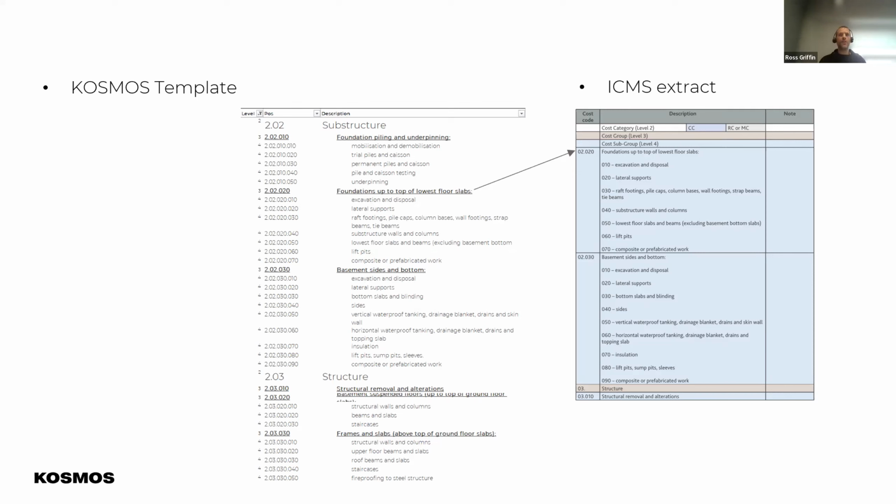We need that initial numbering system here to carry it for us under construction costs, because ICMS is not just construction costs, it's acquisition costs, it's operational costs, it's a whole ream of things like renovation and maintenance, etc., and it doesn't define a number at those main headings. So we decided that we needed to define that, and we wrote back to ICMS on this, and let's see what happens in the future.